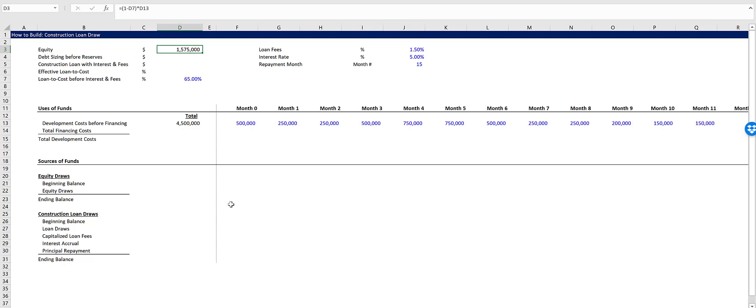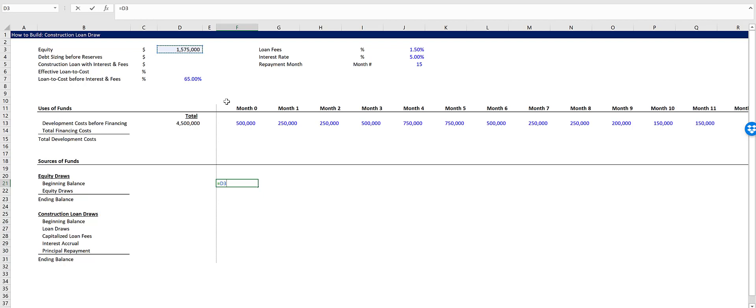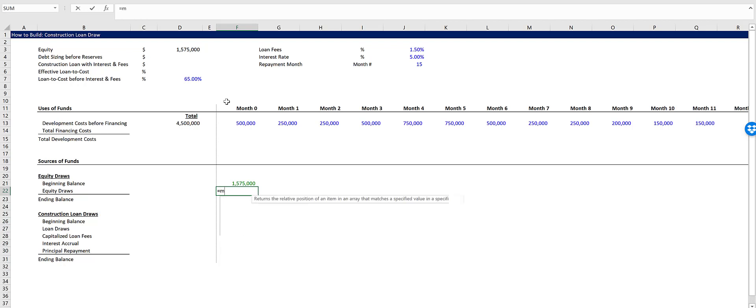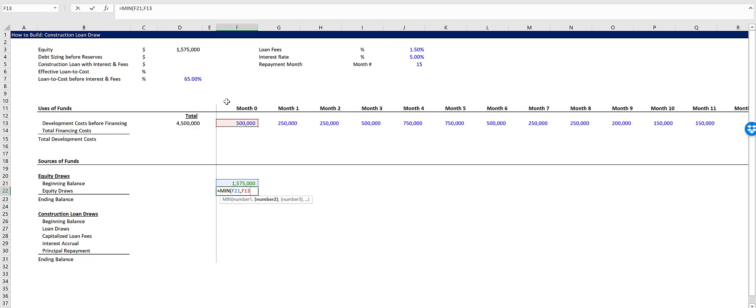We got 1.575 million. So let's link that up in month zero because that's the beginning balance we're going to start with and we're going to draw down from that. I formatted the screen just since it's a linked cell. And our equity draws will be the minimum of the beginning balance and the development cost before financing.